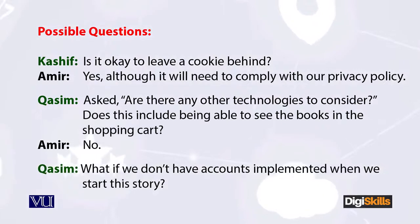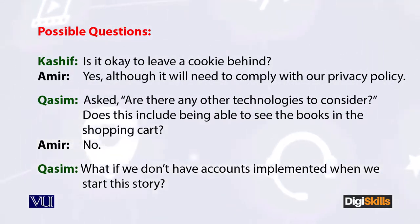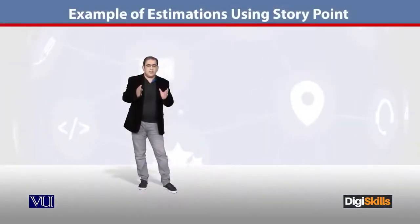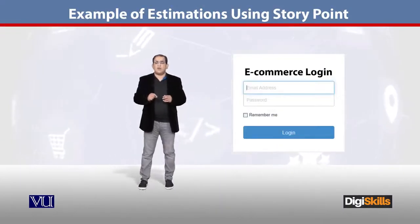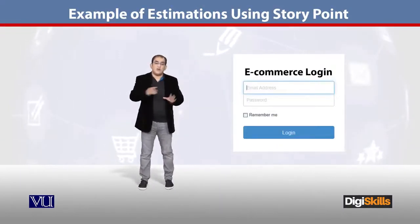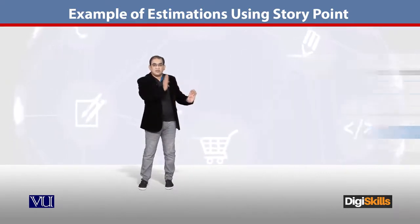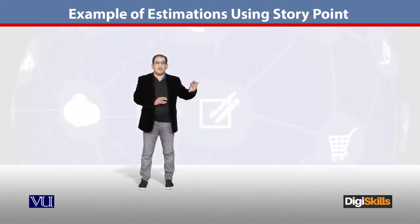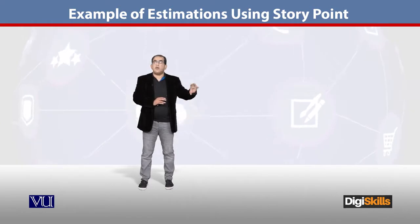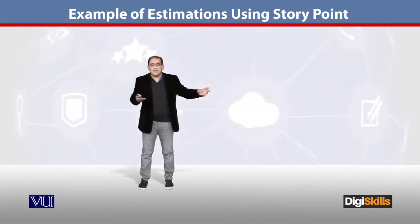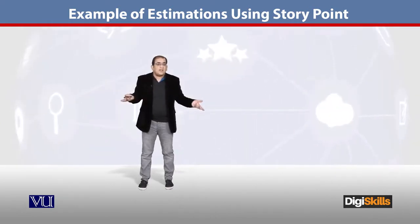For example, if login management and accounts are not yet implemented, then how can we develop this story? This story has a prerequisite — the user must already be able to log in with a username and password. The question is: if the registration module is not yet built, can you start this user story or not? Because the user registration module is a prerequisite.